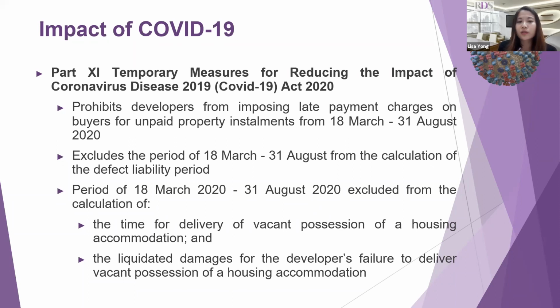It also excludes the period of 18th of March to 31st of August 2020 from the calculation of the defect liability period. Hence, the home buyers may actually apply to the minister to extend the period up to 31st of December last year. The period between 18 March 2020 and 31st August 2020 is also excluded from the calculation of